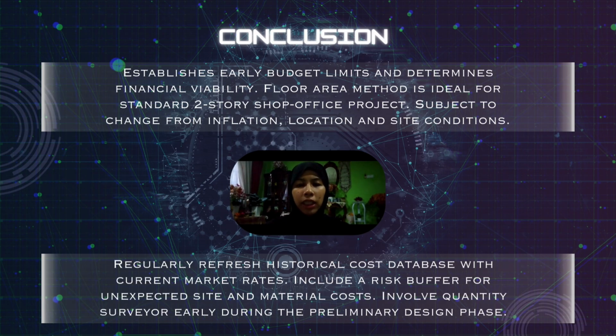To improve accuracy, estimators must continuously update their historical cost database with current market rates while incorporating reasonable contingency allowance for project risk. Ultimately, early collaboration between client, architect, and quantity surveyor ensures that project costs remain well controlled from inception to completion.